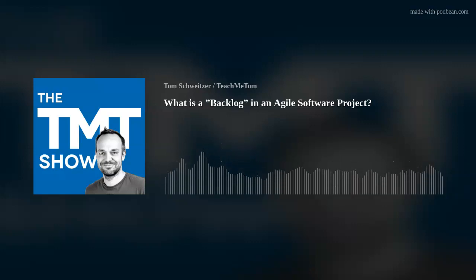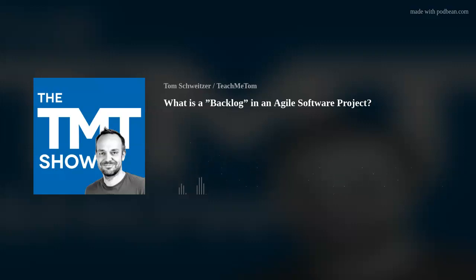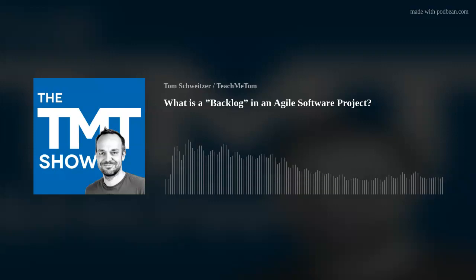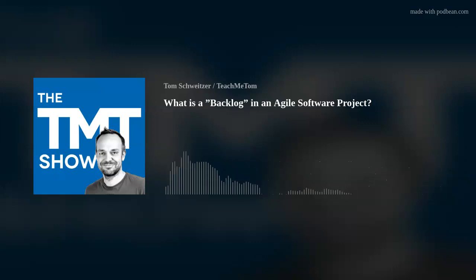Okay, so that's how you plan such an agile project. You don't really plan the next 2 years. You only select the stuff that you want to do in the next 2 weeks that you are able to deliver after the next 2 weeks. And then you're going to break down, okay, what needs to be done? What specifically, what kind of information do we need? What kind of assets like graphics or buttons or whatever do we need?